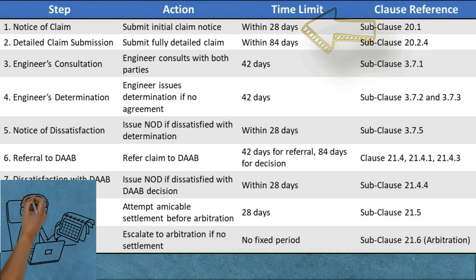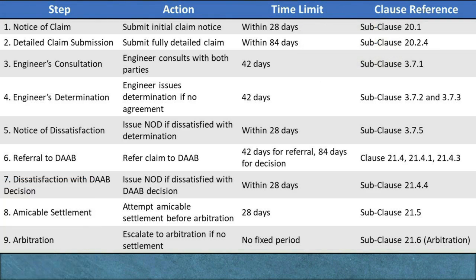Time limit: The notice of claim must be submitted within 28 days of the contractor becoming aware, or when they should have reasonably become aware, of the event or circumstance causing the claim. Clause reference: Subclause 20.1 — Claims. Purpose: This initial 28-day notification period is intended to ensure that claims are raised promptly, allowing the engineer and the employer the opportunity to investigate and take any necessary steps to mitigate the effects of the event or circumstance causing the claim.